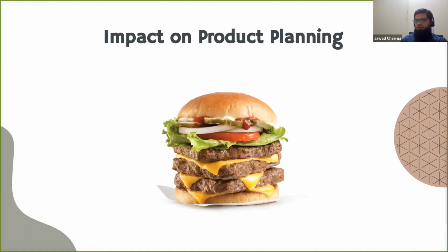So thinking about it with respect to the features, taking as an example of loyalty, right? So if you want to add loyalty to your e-commerce platform, let's say the easiest way for you is to just start computing the points against order placement, right? So order placement is already there, you can start computing the points. So build the logic for computing points, or assigning some points for the order, and you don't even need to tell the customers that it's being done, but you can start doing that. So develop that one bite out of it, all the things that are needed just to compute it, right?